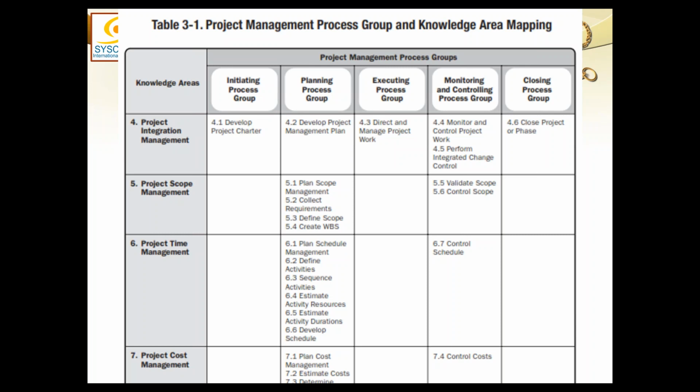Quality control has to do with the deliverable. It checks the deliverable. As soon as a deliverable is received from execution, the very first process which inspects it is quality control. If it does not come up to the standard of quality control, that item is rejected.